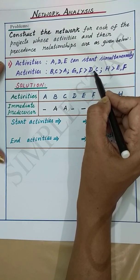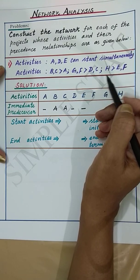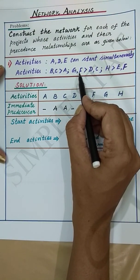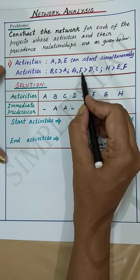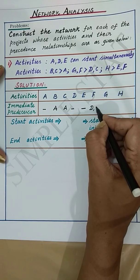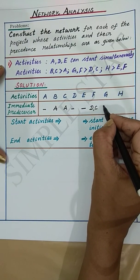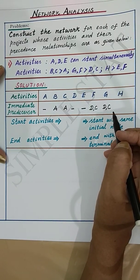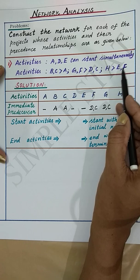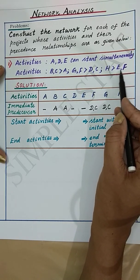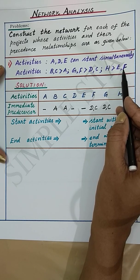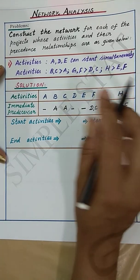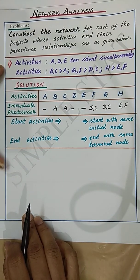Next, F and G follow D and C — this implies that activities D and C are the predecessors for activities F and G. And H follows E and F — this implies that activities E and F are the predecessors for activity H. Let's now identify the start activities and end activities.